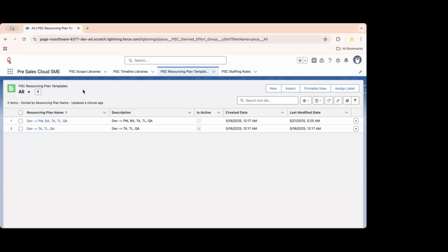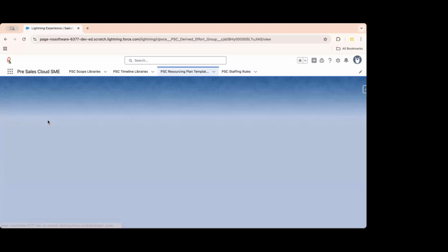That's where what we generally do in our Excel is, if a developer is 100% assigned, we generally need 20% of a project manager, or maybe 50%, 80% of a business analyst, 100% of a tester. Some projects and products need an equal amount of tester time. You would need a release manager for 50% in the later part of the application, something like that. So you can have various mechanisms, but for now, I just wanted to show you that this is a resourcing plan template.